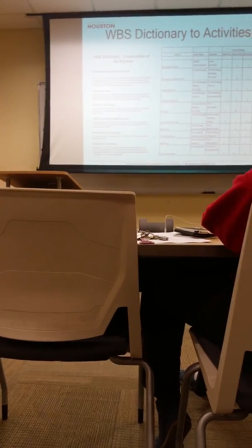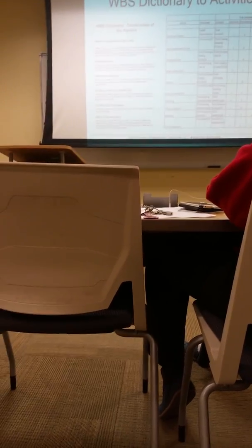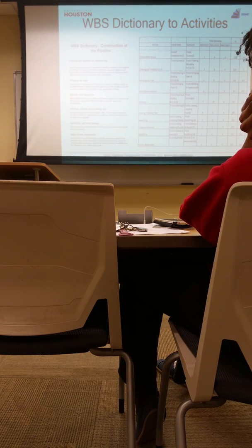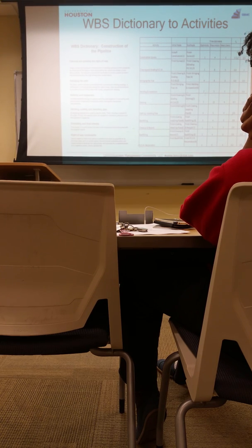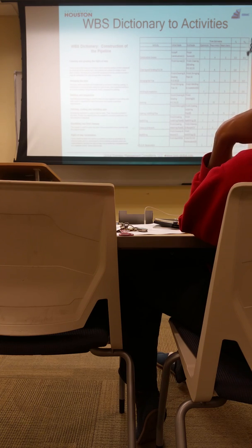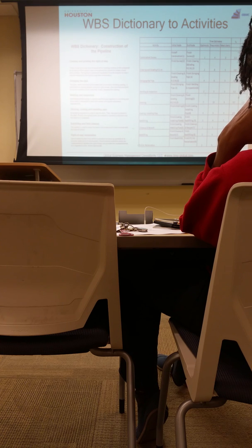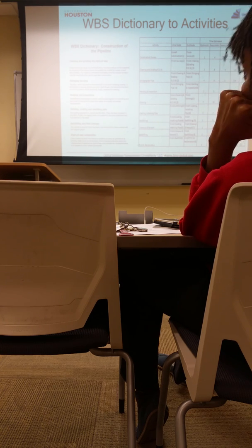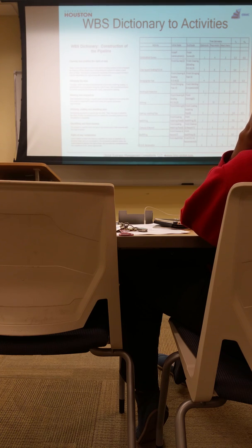One of those paths that if you trip up, you're going to push the schedule out beyond 5 days. That's what the critical path is. I know that's kind of, if you haven't done scheduling, it's hard to understand that. But the critical path is the quickest way to finish the project. And it's also the longest series of activities that you have to finish the project.